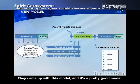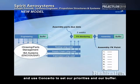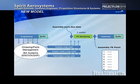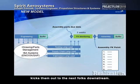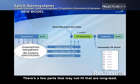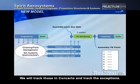For the engineering up front, I've just said we batch our parts and use Concerto to set our priorities and our buffer. And then those parts, once they're released, our manufacturing engineer kicks them out to the next folks downstream, and they enter it into our SAP system and let the internal SAP system drive the parts. There's a few parts that may not fit that are long lead. We will track those in Concerto and track the exceptions.